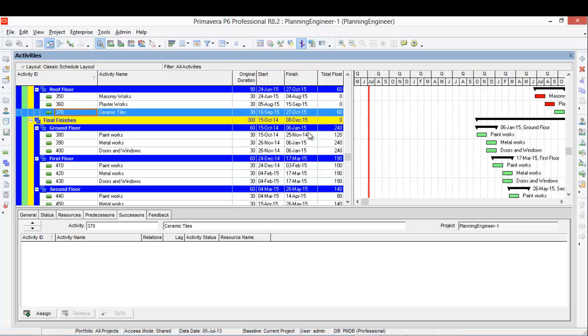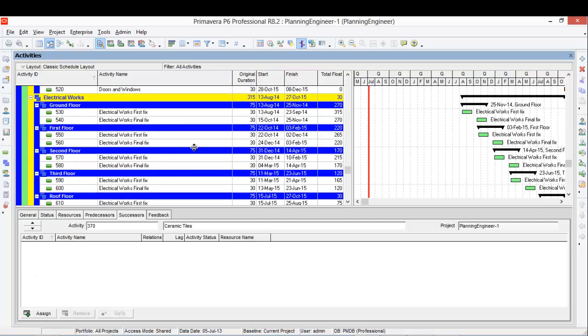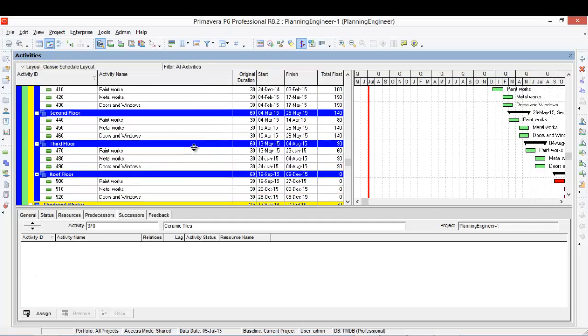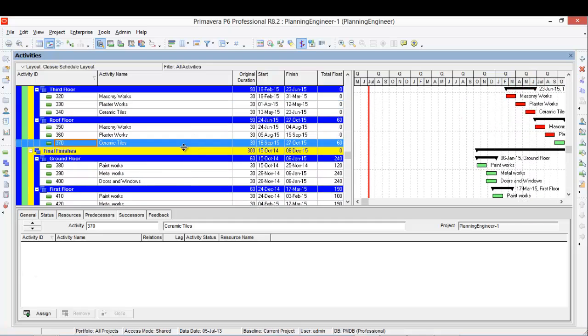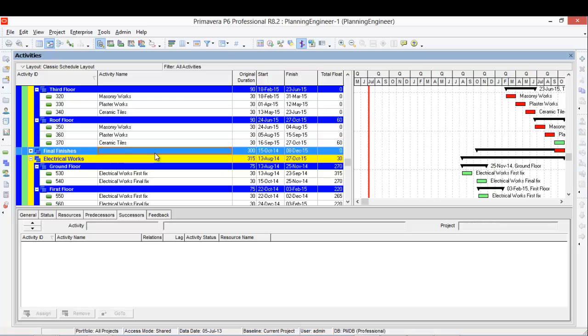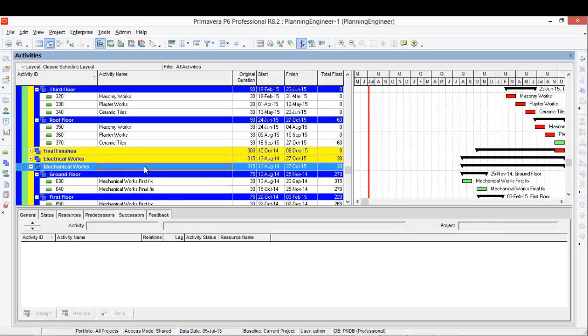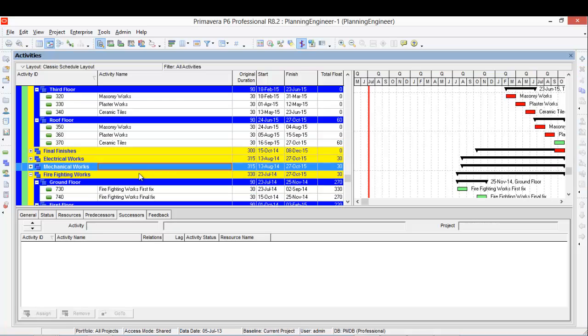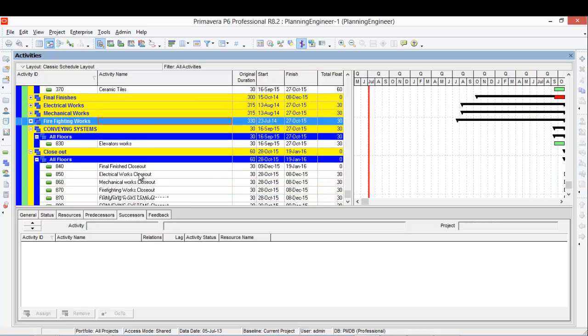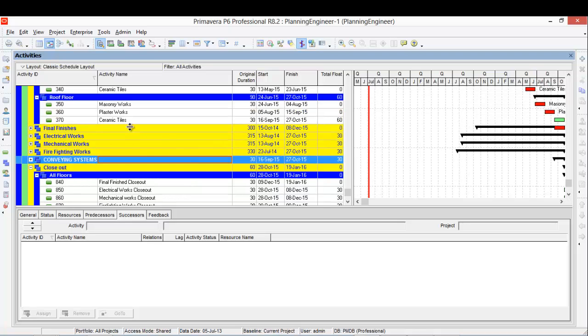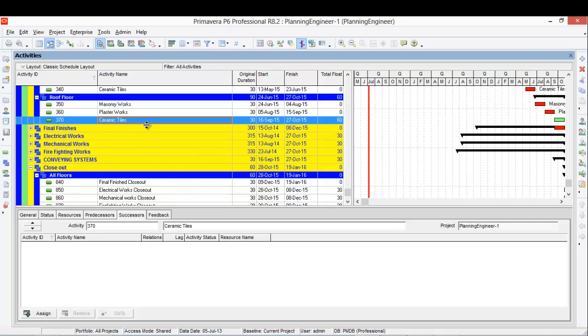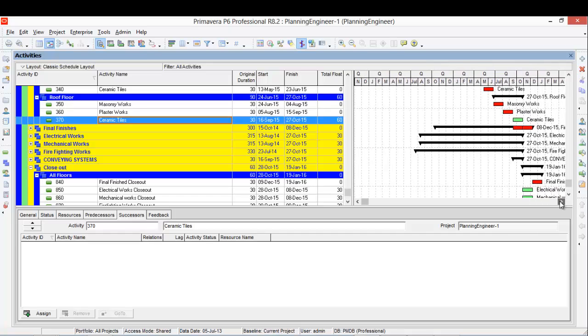It has no successor. So I want to add a successor to it. From the closeout, of course, this one I will link it to the closeout.